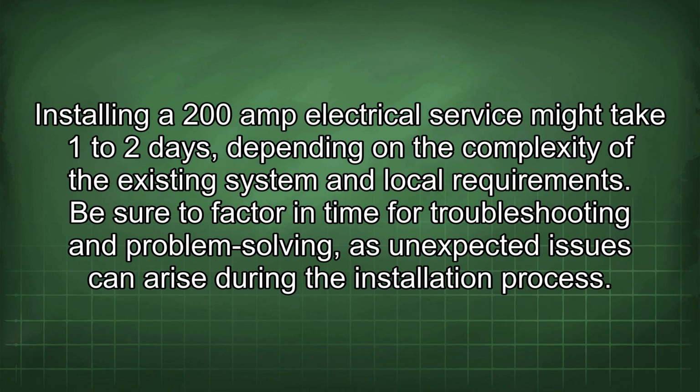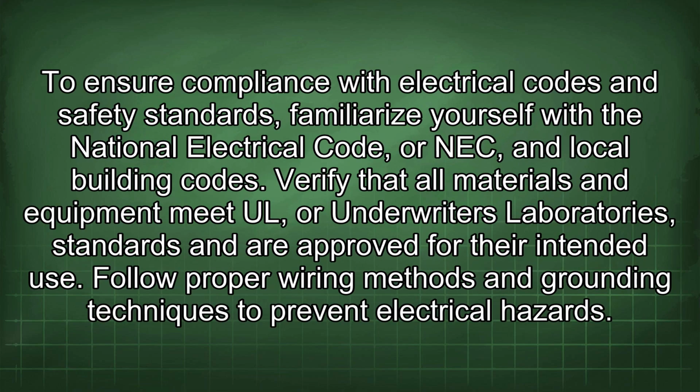Installing a 200 amp electrical service might take 1 to 2 days, depending on the complexity of the existing system and local requirements. Be sure to factor in time for troubleshooting and problem solving, as unexpected issues can arise during the installation process. To ensure compliance with electrical codes and safety standards, familiarize yourself with the National Electrical Code, or NEC, and local building codes.